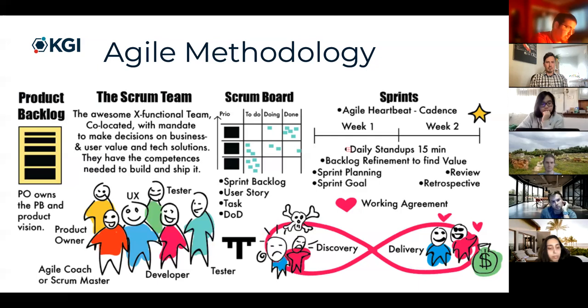A Scrum Board, this is another thing that a lot of people will use in Agile. And I'm going to create templates for you to use while you're creating your prototypes. The idea here is that you're taking the items from your product backlog and saying, okay, I would really love to get these 3 things done during my sprint. Remember how I said that an Agile iteration has a fixed timeline? So a sprint will be that timeline. It's usually around 2 weeks. So for a 2-week sprint, I'm going to say, I want to get these 3 things done in this order.